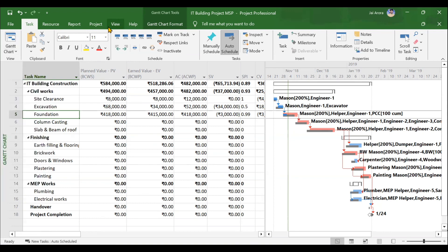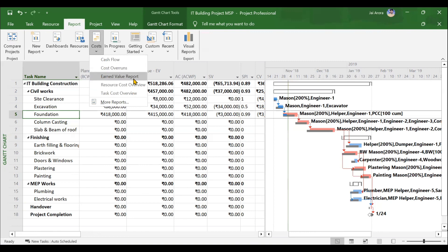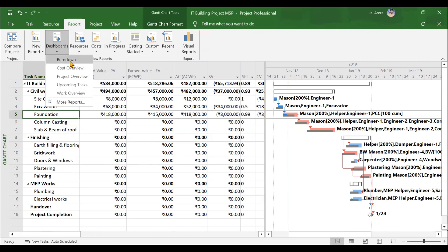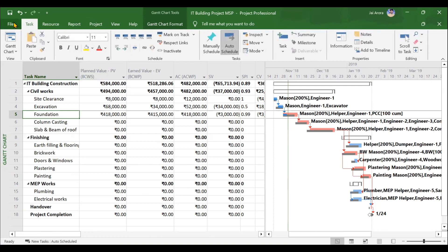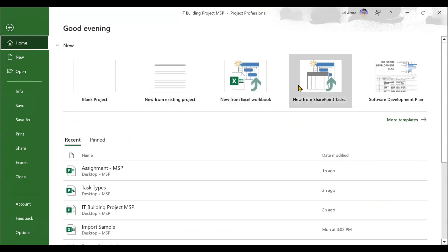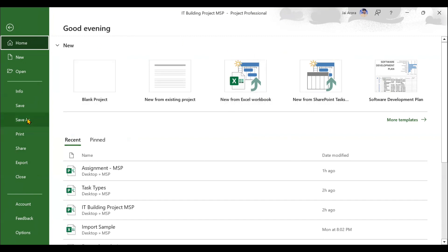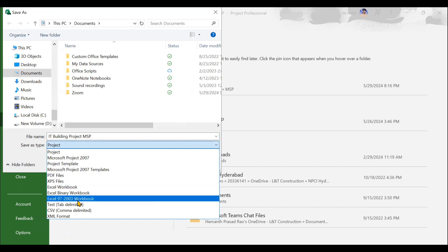After that, we will be moving to reporting and printing. In the Reports section of MSP, you can create several types of reports like resource reports, over-allocated resources, and resource overview. Similarly, cost reports like cash flow, cost overruns, and earned value report. In progress reports you can show critical tasks, late tasks, milestones, and slippages. Dashboard reports include burndown and cost overview. All these reports we will be creating and printing. Towards the end, we will be exporting and importing the project. Using the New from Excel Workbook option in the File menu, you can import any Excel workbook file to MSP. You can also export your MS Project file into PDF, XPS, Excel, CSV format, and more.